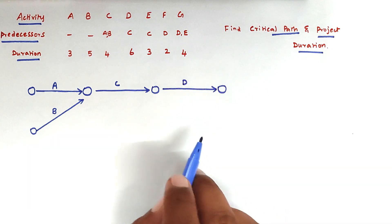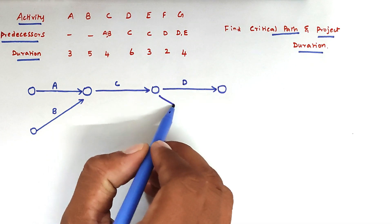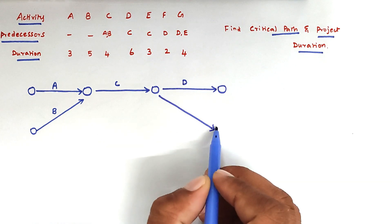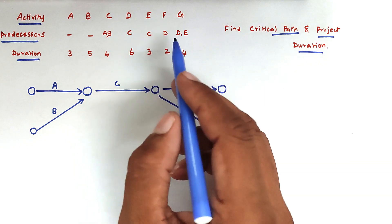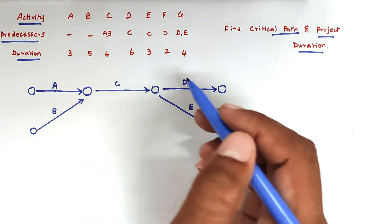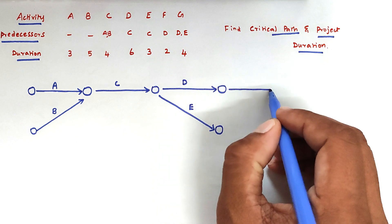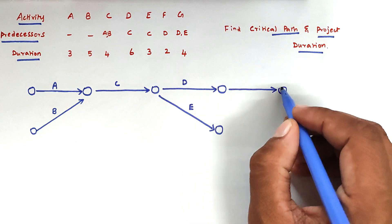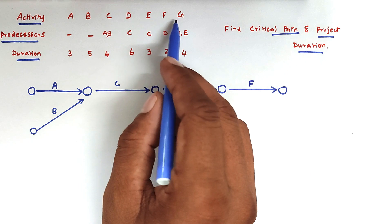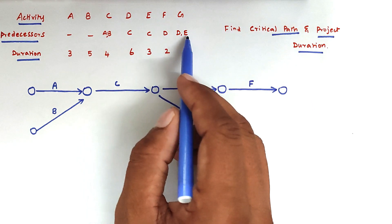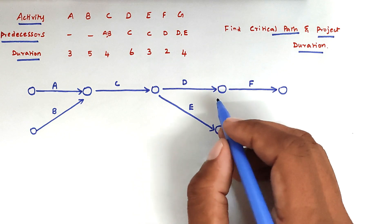For D activity, C is the precedence activity. Then E activity also has C as the precedence activity. For F activity, D is the precedent activity. For G activity, D and E are both the precedent activities.